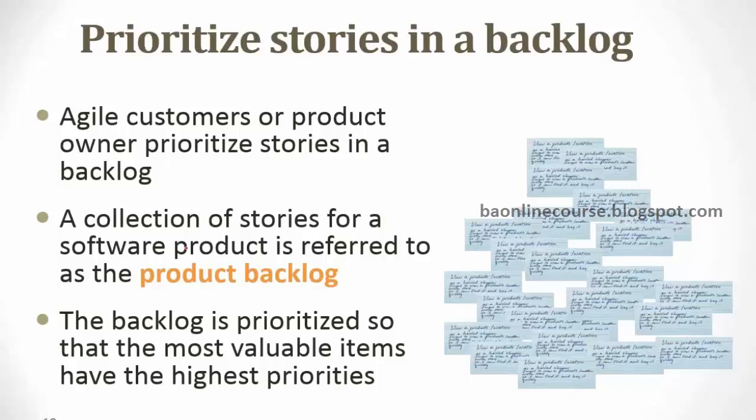Okay, so your product backlog is a prioritization of these features. Now, which is the most important feature in your mobile banking app? Maybe I would say I want to check account balance and transfer funds. Those two are most important. Then maybe the login feature, because without that I cannot even release it to the end users. Maybe paying of bills, or buying things like booking movie tickets, can come in later. They're not so important to me.